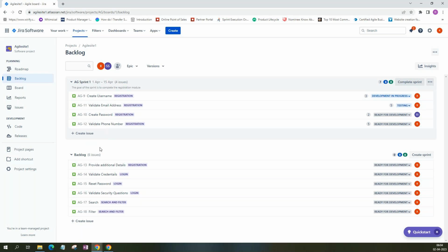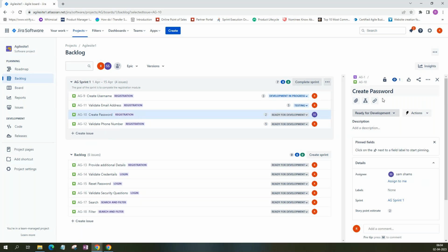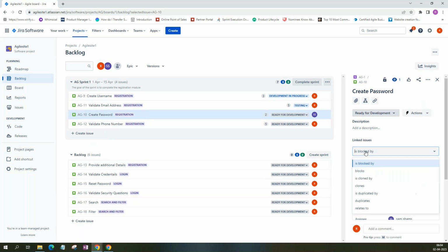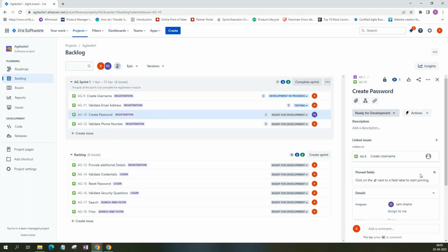How can we tag it? What I'm saying is, assume this issue, link it. Here is link issues. Here it says "is related to", put that defect ID here. Then it is easy to track. I'll just put this for now, but you can put the defect ID. So it says this issue has this defect ID, which has to be tracked, so that we don't lose track.